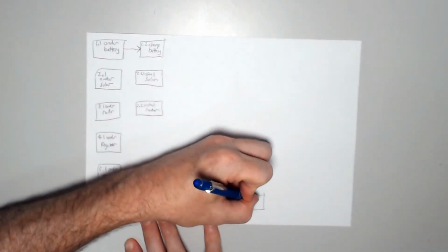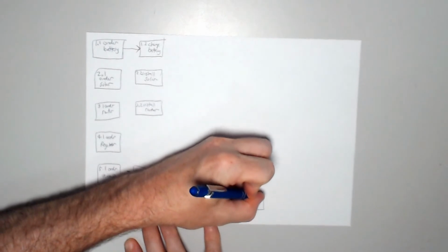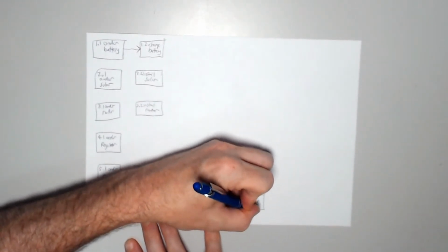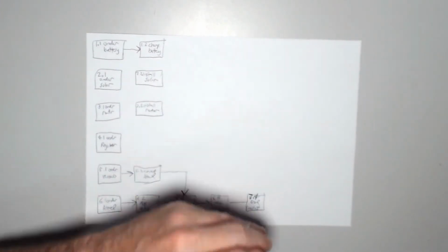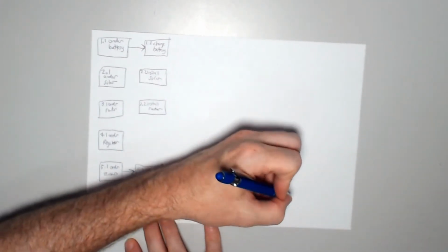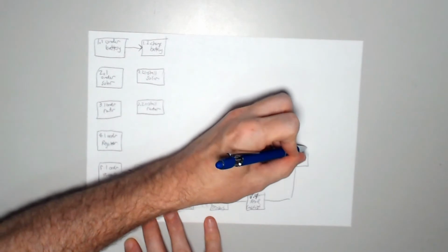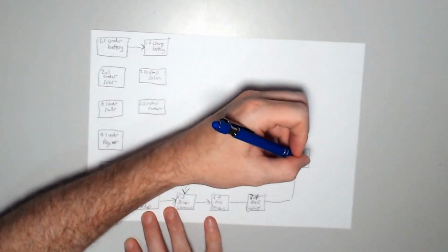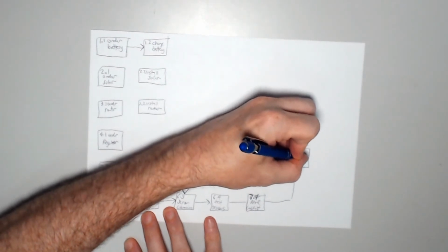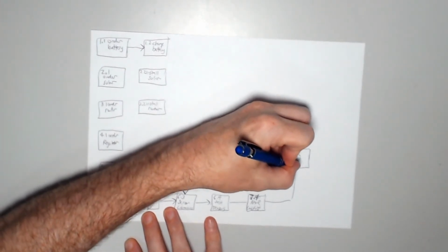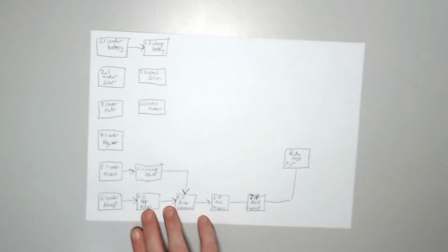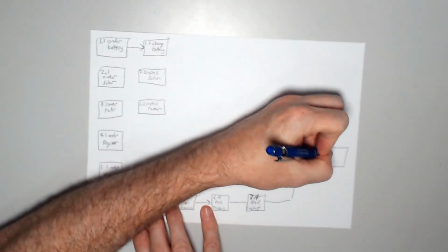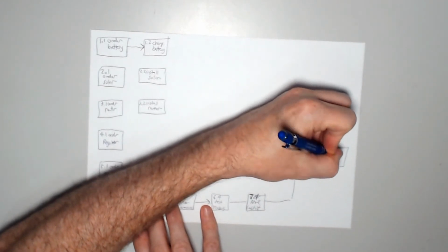So I actually got the numbering wrong here. This was 7.4. 7.4 was Atmel lab test. And then after that, we were going to do a beta test. So this is like the final test before we commission. So that's 7.5. And then we're going to need to commission at some point. So this is the final step over here, is commission. 7.6 commission.